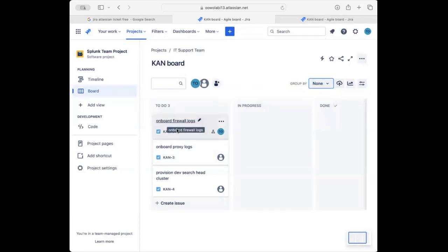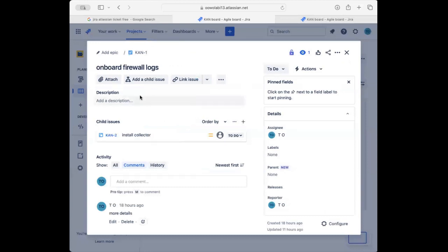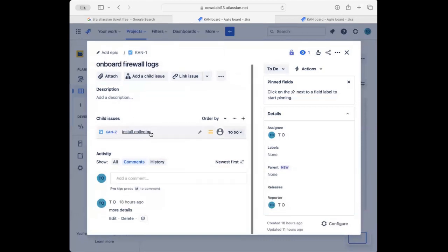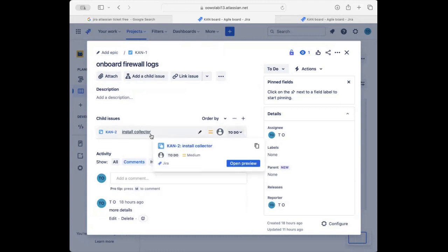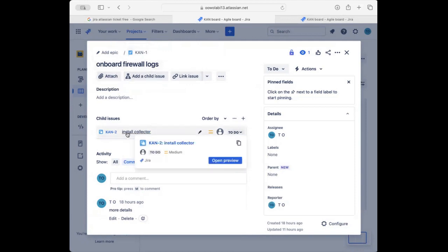That's okay. Now, if we go into this ticket, the same as the Scrum-based project, the tickets are structured the same way. If we click it, once again, we have a title. You have the ticket number, you have the title, you have a description, which we don't have, and we definitely should. We have child issues here. Does everything need a child issue? No, some things will need them. And if they do, make note of it in the ticket so your team knows that you're working on something. They know that this overall parent ticket isn't complete yet because we're still working on one of the child issues. All right. Again, detail your tickets with comments.